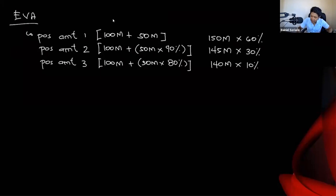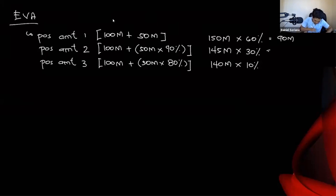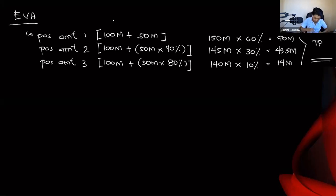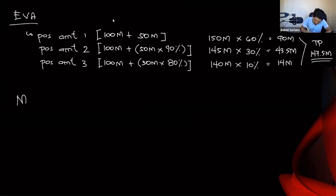Under the expected value approach: 150 million × 60% = 90 million; 145 million × 30% = 43.5 million; 140 million × 10% = 14 million. The transaction price equals 90 + 43.5 + 14 = 147.5 million pesos. Requirement A answer: 147.5 million pesos.